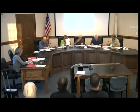I'll move that we consider this to be a small project consistent with letter L. Second. All those in favor say aye. Aye. Opposed, and that's unanimous. And I move that we approve the small project as submitted with the recommendations of Mr. Lynch. And do you want a pre-construction, Jen? Yeah, we should do a pre and a post. There should be no stockpiling in the 100-foot buffer zone, so any material you need to stockpile should be outside the 100-foot buffer zone. So pre and post and no stockpiling? That's my motion. And I'm seconding. All those in favor say aye. Aye. Opposed, and that's unanimous.